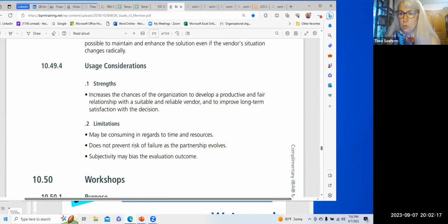And then once you make a choice on a vendor and you sign a contract, y'all are part of the same team. You're going to have to make it work the best you can. If you have guidelines in your contract, though, that say if you do this or this or this, there's a penalty of this if you don't make this target, give them a reason to help you succeed. That makes it painful for them if they don't help you succeed.